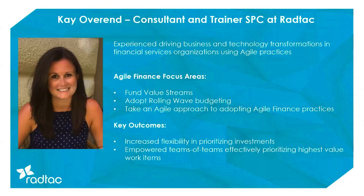And I think the third benefit really is around, it gives us a far more detailed look at the total cost of delivering that project. So when we fund at value streams, we're able to identify the full cost of the project delivery or the system delivery, because all of the capabilities that are needed to enable that value delivery, to plan, to develop, to operate, are part of that value stream. And as we know, we have a fixed cost for that value stream, or that program increment, if we want to go to a slightly shorter level of a time frame or granularity. What we can then understand is the metrics around the cost of running that service from an end-to-end capability, rather than thinking about how much does it cost us to build it, how much does it cost us to operate it. So it gives us that total product cost rather than that siloed thinking around development and operational cost.